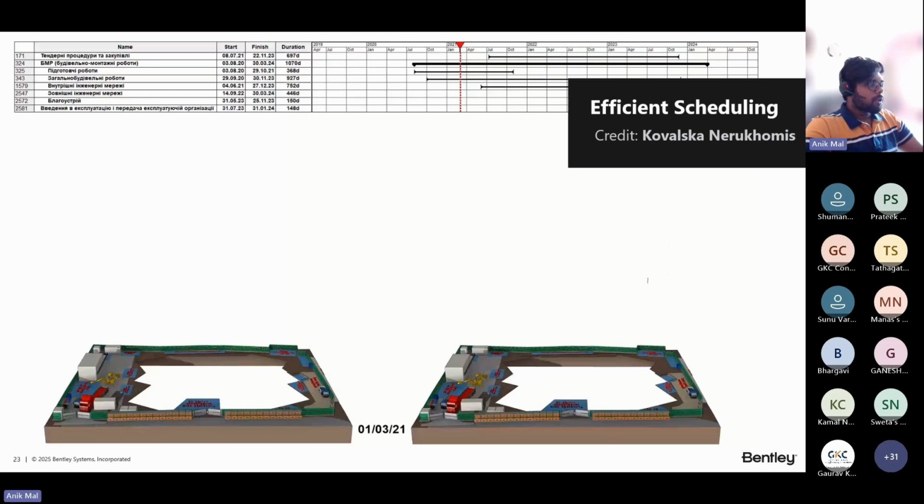I would like to note in this particular simulation, if I just go back to the video, on the left side you can see the construction of the core structural areas. And at the same time, they're also simulating how the construction of the MEP discipline is taking place in parallel. And you would see, as the top part of the building is in progress, they have already started working on the bottom part of the building, in the lower floors, on MEP construction.